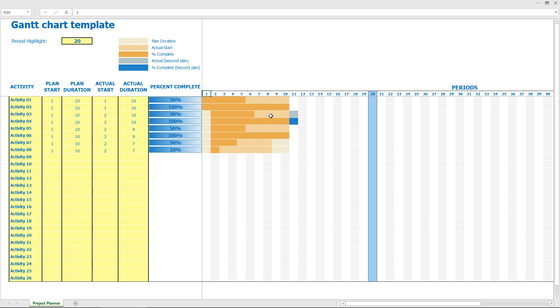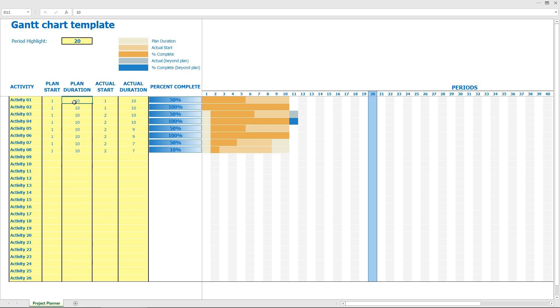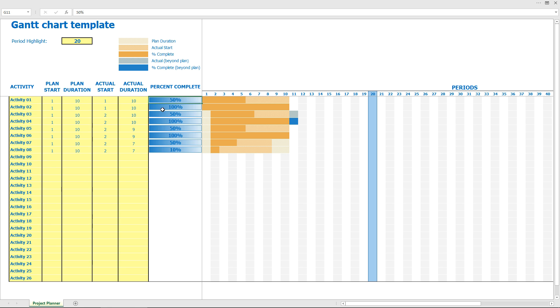Then what we have here are a few examples to show you how it works. For example, we have planned start at first day, let's say, and 10 days duration. Actual start was first day and actual duration was 10, so everything under plan in progress, complete is 50%, which shows you like this.